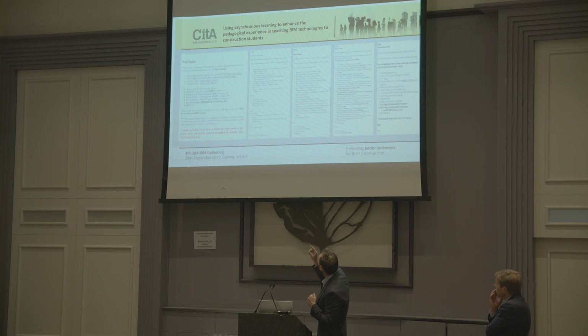So they did 4 tasks, and it basically simulated a design and cost management project. They were given a model, a mass model. They did a cost plan on that mass model with very little information, applying cost. And then they were given another model with a little more detail, an elemental model, going through the levels of detail in BIM. And then they were given another model which is nearly completed design. And then they were given that same model with some changes.